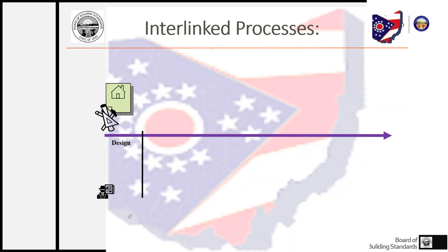He needs to be considering the state fire marshal's rules and what they may have for fire prevention. He must think about local ordinances and what rules they may have, zoning requirements, most notably maybe some architectural review requirements if the jurisdiction wants the building to look a certain way.